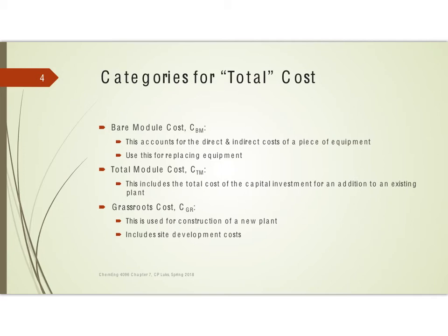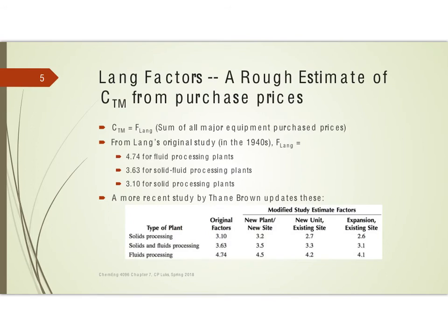A grassroots cost says you're starting with nothing — for example, you purchased a cow pasture and you're going to build a chemical plant on it. In that case, you're going to have site development costs, which will cost you more. So those are the three categories we will use. One way to take the purchase price and move to total module cost — or even grassroots cost — is the Lang factor approach, which takes the purchase price of the equipment, C sub P, and turns that into the total module cost.